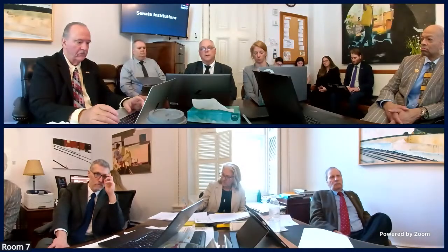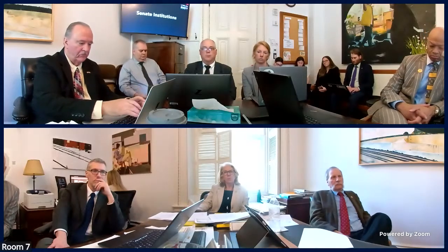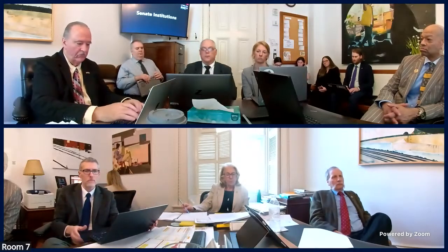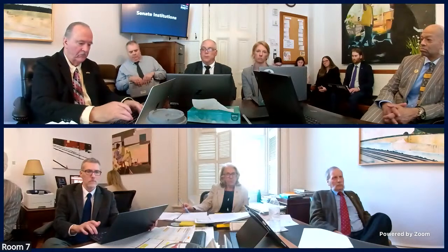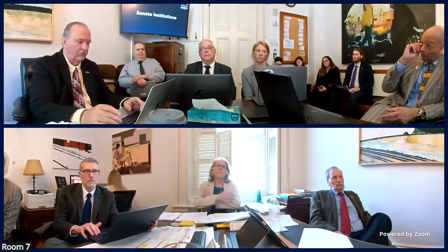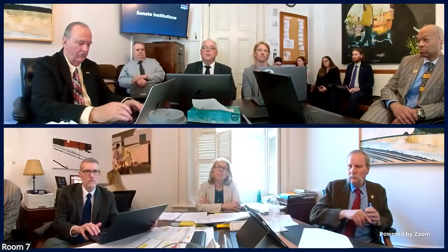Correct. So the long lead items for this project are the boiler itself, which is approximately 6 months from the time the shop drawings have been approved and it gets ordered. So once it's ordered, to the time it arrives, it's about 6 months. And then we also have the red iron, the structure for the building itself, which is another lead item. That's roughly about 4 months out to have in place.